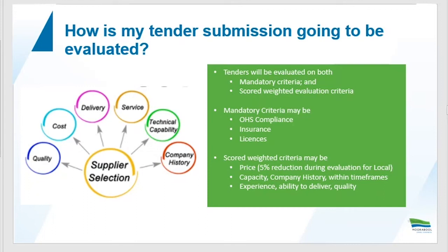The procurement policy within the proposed new legislative framework does outline exactly how many officers have to evaluate different submissions depending on the value and the complexity of the procurement. So at the lower base procurement, where it's just a request for quote process, it may only be 1 responsible officer evaluating, but from a tender procurement process, there's a minimum of 3 officers on that panel evaluating each submission.